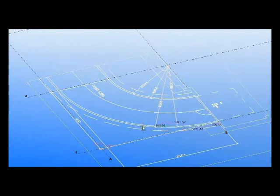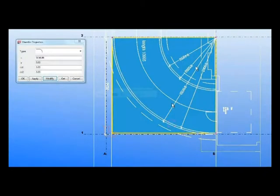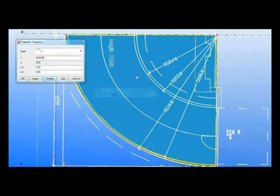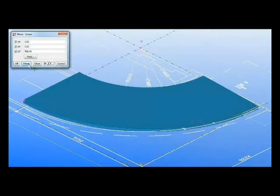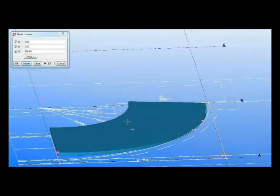As you can see there, I'm just making a start with figuring out the quantities and the buildability of this curving ramp. As you can see, it's basic modeling in Tekla, in this case concrete, very simple, using simple tools like chamfering a slab, chamfering the outside, then going across the inside and chamfering the inside. But of course, this slab is rising. I've got about a 1 in 8 to 1 in 10 slope on that. So let's bring up the edge of that slab. As you can see, it's twisting like a corkscrew now. Quite difficult to measure that with just a simple ruler on an A3 drawing. Much simpler to just model it.